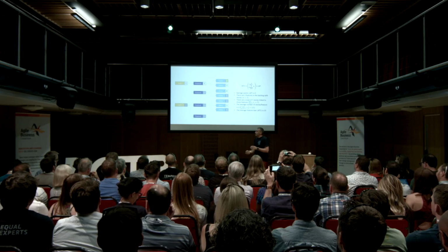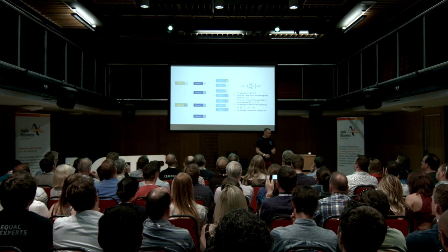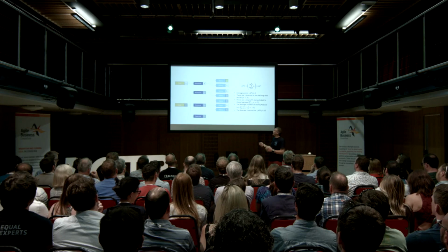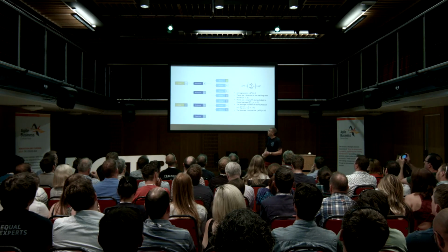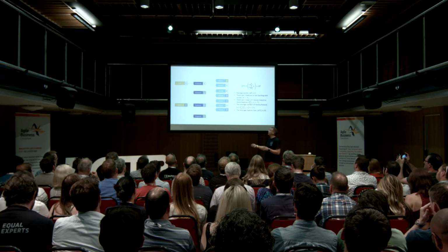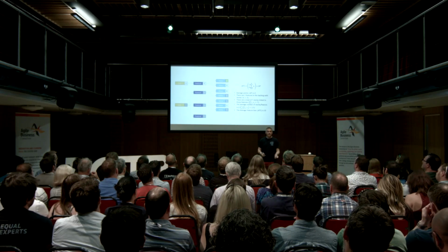So what we want to do is get a quick idea of how big this feature is. How big is it likely to be? What impact does that have on my backlog? To work that out, again, we'll use a similar approach to what we did with the stories. But this time, instead of using the average size of the features, we're looking at the average number of stories that a feature has.